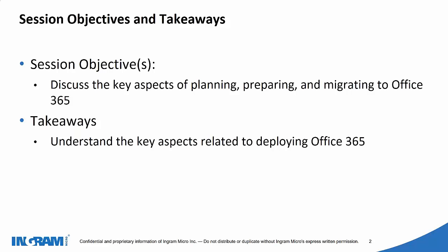So I have a question here. What will be the downtime for the email on MX record change? So normally the market standard for the MX record change is 48 hours. That's what the recommended time is, but it takes time. So the industry standard is 48 hours, and the industry suggestion is to do the cutover, the migration, the MX record change over the weekends.